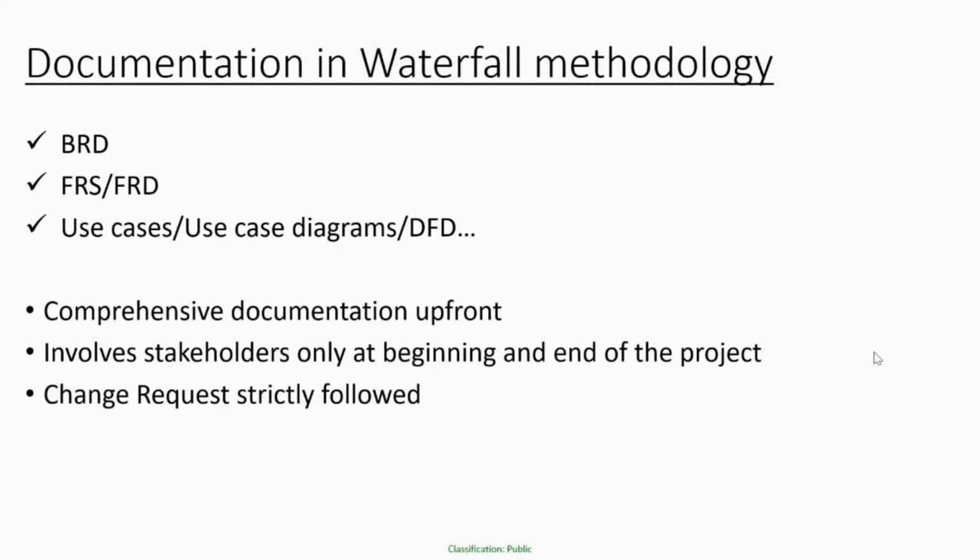and then seeing, of course, before effort estimation, there'll be a technical feasibility study done. You want this requirement to be changed, fine, but is it first of all technically feasible? That has to be found out. And after that, there'll be an estimation. Okay, it is feasible. Now let's see how much time it takes. And then the project manager also will be involved to see if it is really impacting the overall timelines. And only after all of these steps have been taken and it has been observed that it is high priority, we need to really deploy it or develop it as soon as possible, then it gets into the plan of development and testing. So this is a very lengthy, tedious, time consuming process whenever any changes are expected.